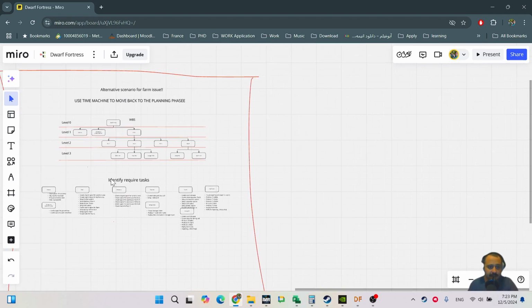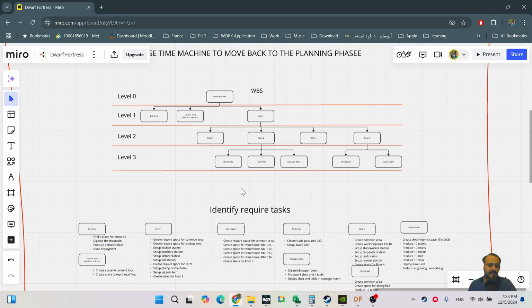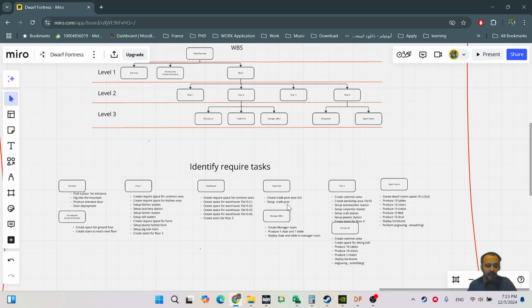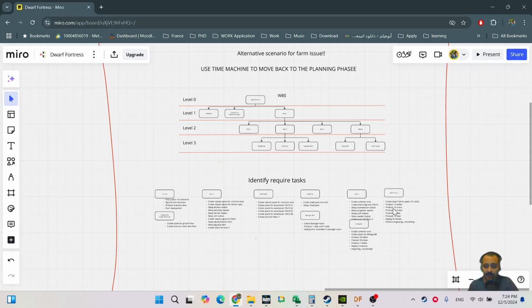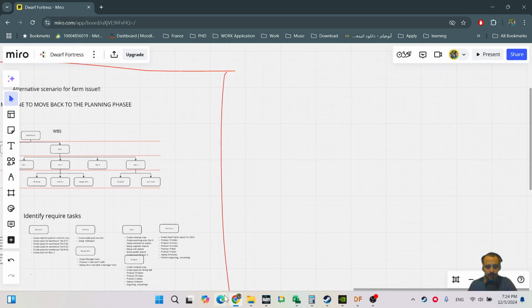Okay, so now let's say you performed the WBS, like everything you had so far, and you identified the tasks. Your resources are available, and you discuss with your resources. Then you gather your team and your experts, especially those who have experience handling this task in previous projects, or you have documents from similar past projects. What you normally should do is try to identify possible risks. Normally we call it the risk log.